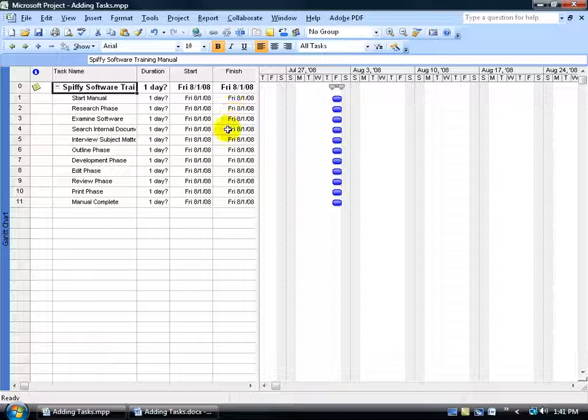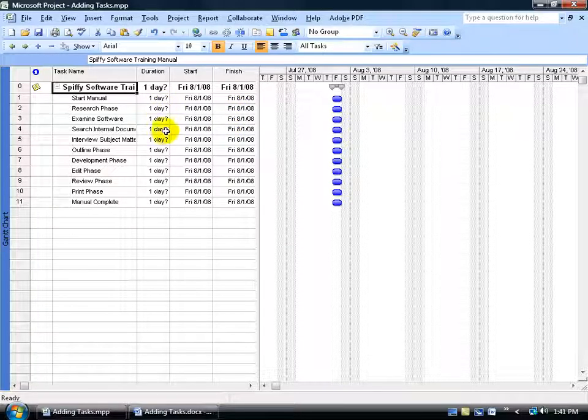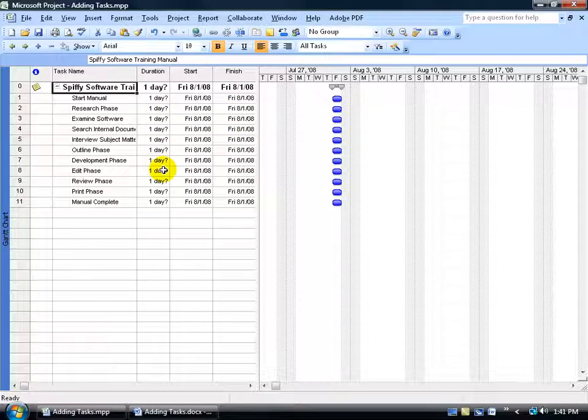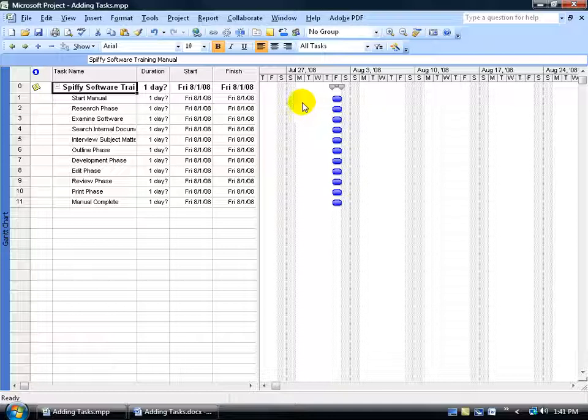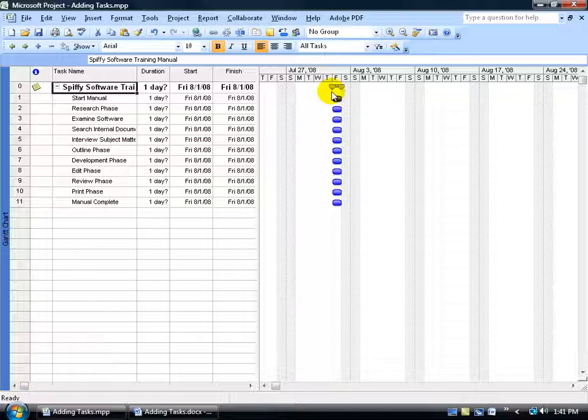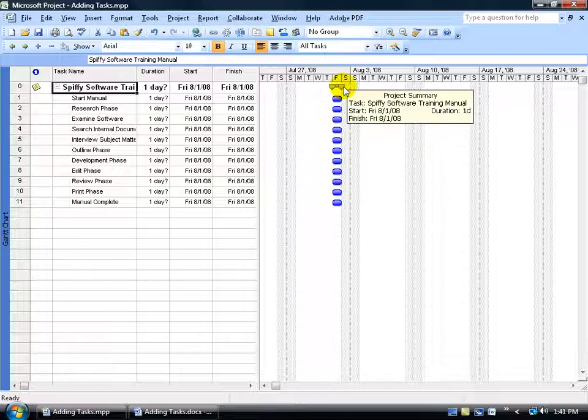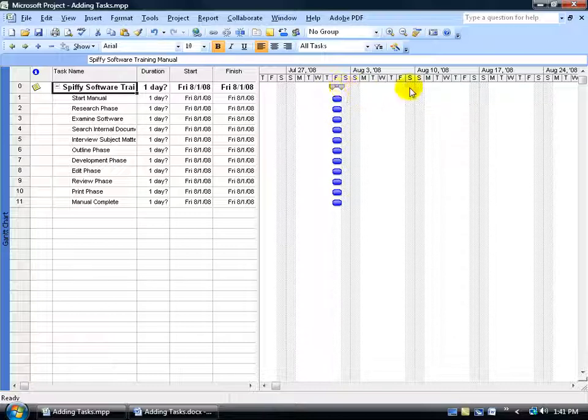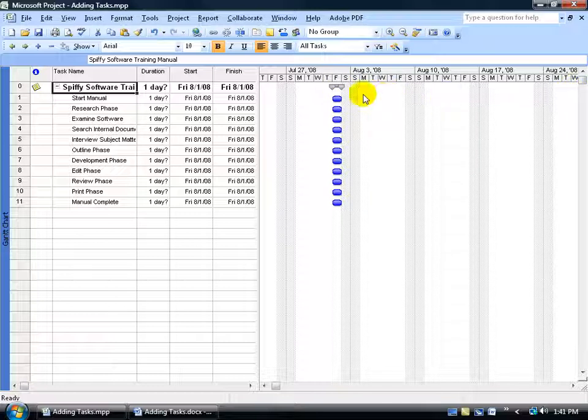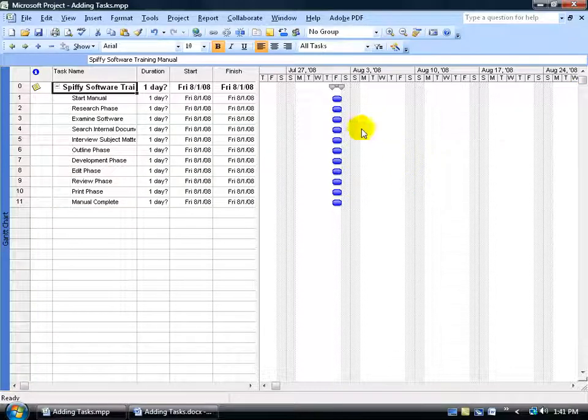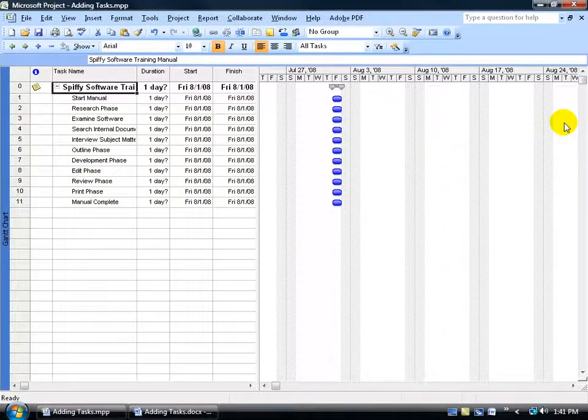And you'll see more of this in the next training video on setting up our durations because not all of them are going to be one day. In fact, visually it looks better over here in the Gantt chart. In other words, up at the top you've got your project summary. It's got the first little starter marker here and it'll always stay here on the start date. Now as these tasks expand and go out to 5 days, 6 weeks, or so on, this end marker is going to stretch to capture that. So you can see as a summary as a whole that in order to complete the whole project all these tasks below have to be completed including the one that goes all the way out for 2 or 3 months.